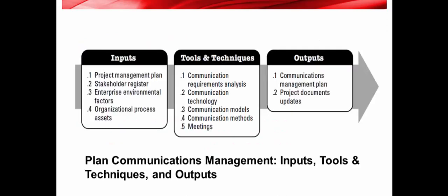Plan communications management process. Inputs: project management plan, stakeholder register, enterprise environmental factors, and organizational process assets. Tools and techniques: communication requirement analysis, communication technology, communication models, communication methods, and meetings. Outputs: communications management plan, project documents updates.